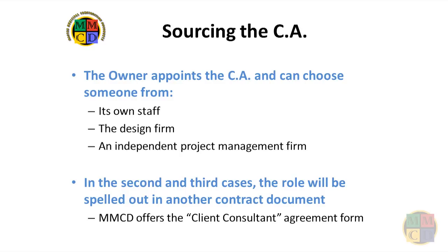However, due to the inherent nature of the conflict among the CA's roles, I recommend that the owner issue some form of letter of understanding to the CA when that person is appointed. This letter should indicate that the owner understands and recognizes that the potential for conflict of interests exists, and expects that the person appointed to be the CA will act impartially as is required by the contract language. This is particularly important and valuable when the CA is one of the owner's direct employees.